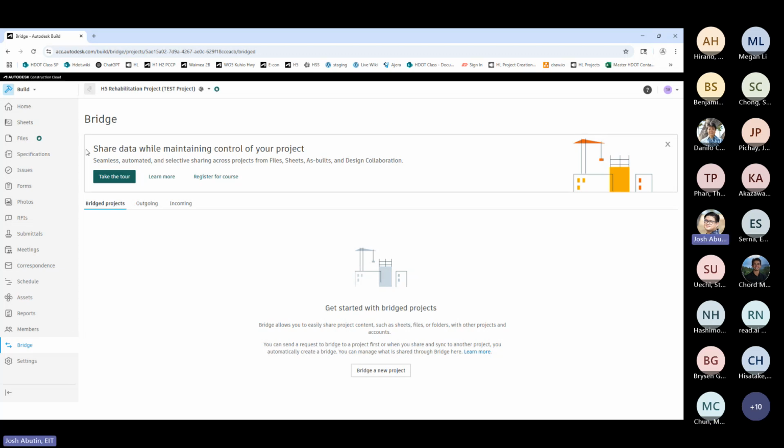I was just gonna jump in real quick. So I think we're gonna have to hold a separate training for as-builts because there's kind of a lot that goes into that. Basically the as-builts are required by the contractor, right? So it's kind of a whole separate thing where we need a set that the contractor is using to mark their as-builts that we would then review.